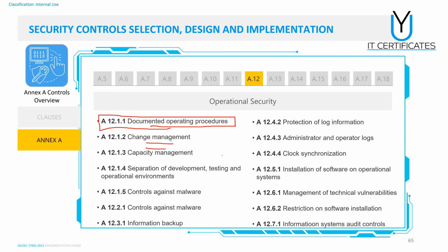Then you have to propose this change to the CAB, which is the Change Advisory Board. We have to study it and make the mandatory and necessary changes or actions. After that, once everything is running fine, they schedule the change, implement it, monitor it, and make sure that the change achieves its objective.